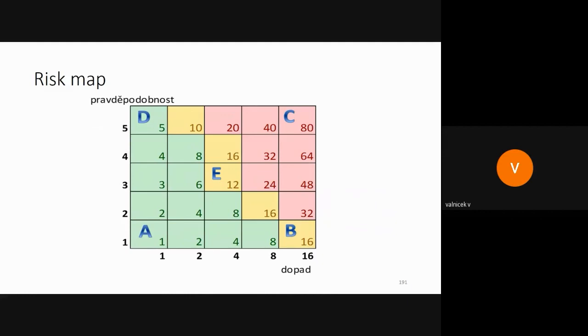Okay. And the fire extinguisher is influencing what? The probability or the impact? The impact. Okay, so the fire extinguisher is so-called a reactive approach. So when the risk occurs, we will react and we will decrease the impact. So the one approach is so-called reactive approaches.